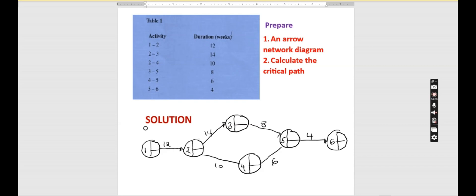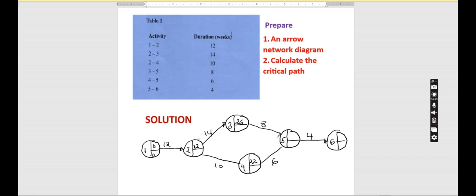The first activity starts at 0. Let's find the earliest estimated time. 0 plus 12 gives us 12. 12 plus 14 gives us 26. 12 plus 10 gives us 22, and 22 plus 6 is 28. Then 26 plus 8 is 34. We take the bigger one, which is 34. Then 34 plus 4 gives us 38. So the project end is 38.